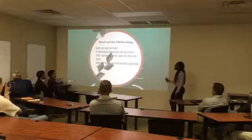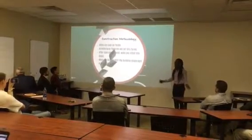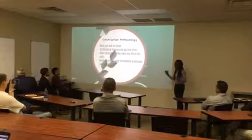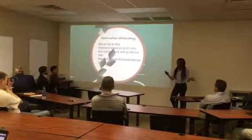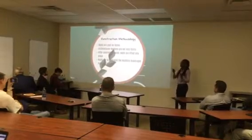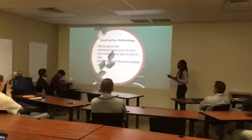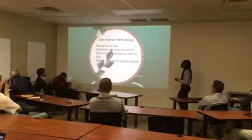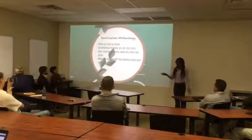a form that's made, and all architectural features are actually put in prior to anything being done. So we had a break, so we put that on first before anything else was done. And then the concrete is poured, and once the concrete is cured, the walls are then lifted into place. It nearly gave me a heart attack because I really thought they were going to fall. Anyway, the walls are then braced until the building diaphragm is locked in place.